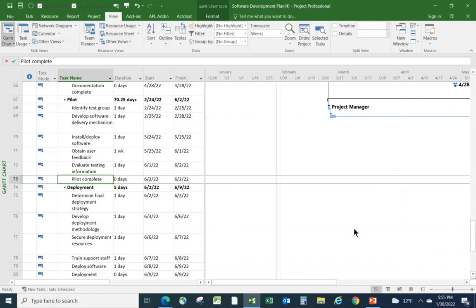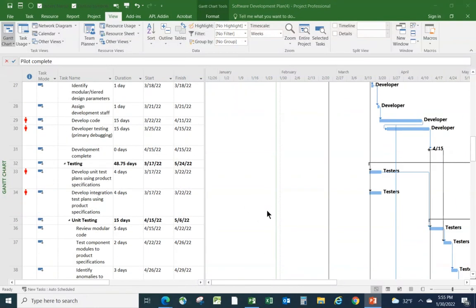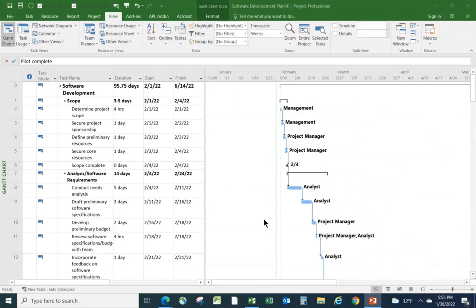Okay, we mentioned the fact that one of the things we're going to do is to take a look to see what tasks in this schedule are critical. And critical means that the task cannot slip or it cannot become longer without delaying the overall project. So let's demonstrate that just quickly. And again, look at some of my other short videos on the science, if you like, of critical path analysis. But for now, let's look at a schedule we've put together.